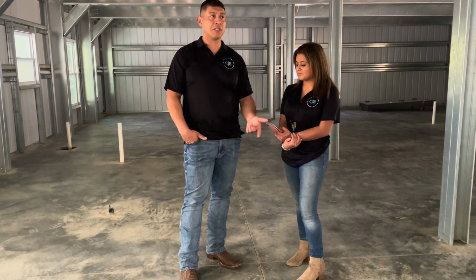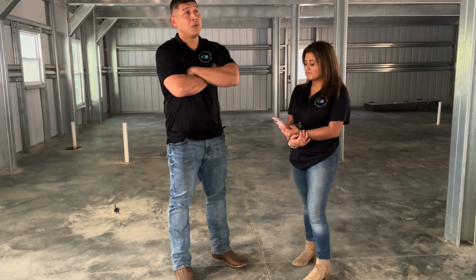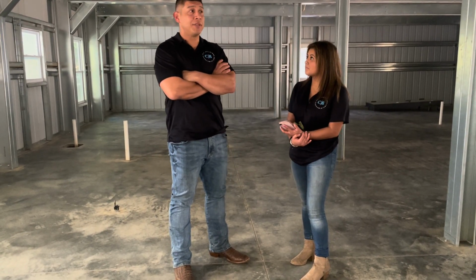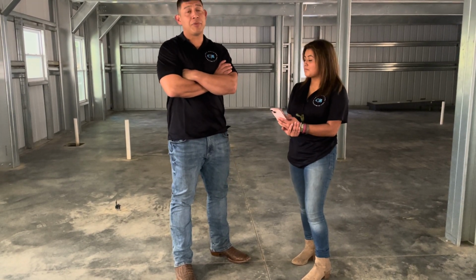Then one of our general contractors, one of my partners, will go out to your job site, and based off our in-house estimating team, they'll do a full analysis of what you want for your finishes, whether you want quartz or granite, high end or low end. Do you want crown molding, do you want hardwood floors or laminate? That can vary in price, so your money's really poured into the finishes.